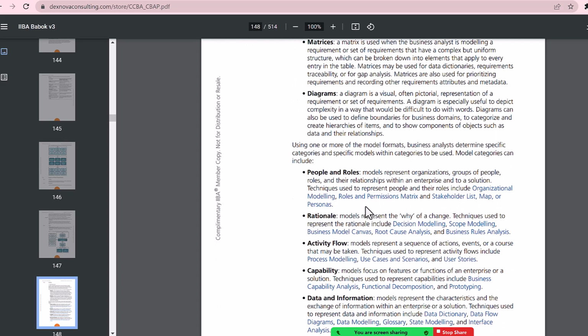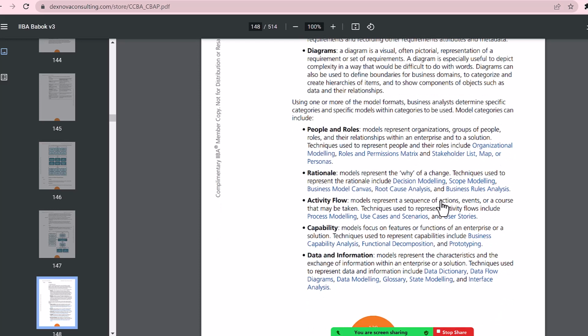So once you do some kind of documentation, now you have to determine who are the right people for confirming those requirements. For example, we have to take a stakeholders list. Okay, and then we need to understand, from all the four business owners, who is the person who has to approve all these requirements? Who is that one point of contact who will be providing us the sign off? So you need to understand how many people are involved in this project, what are their roles, and who will be the person providing that sign off.